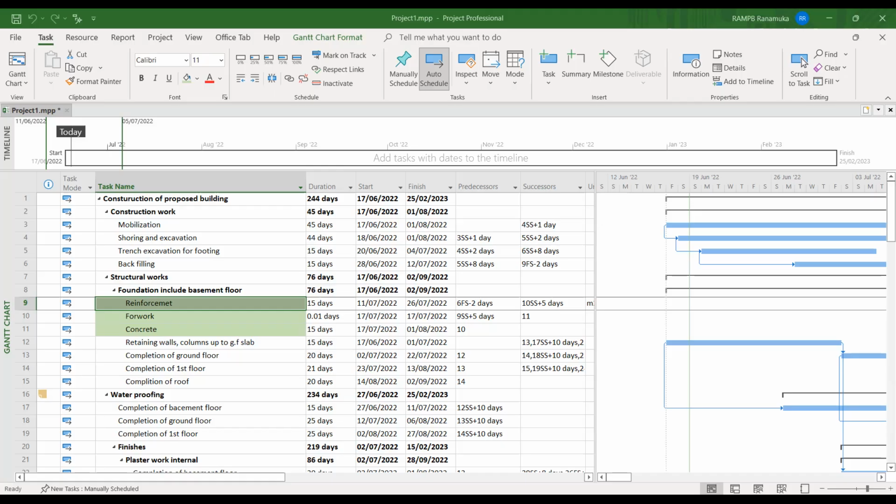For the structural works, completion of the first floor structural work, we can do without this concrete work, formwork, and reinforcement. But most of the people just copied my chart with the link and prepared that. So I expected that you should include this concrete, formwork, and reinforcement, and if you can, some other items, because if a column height is more than 3 or 4 meters, we can't put the concrete at once, so we have to break it in stages.